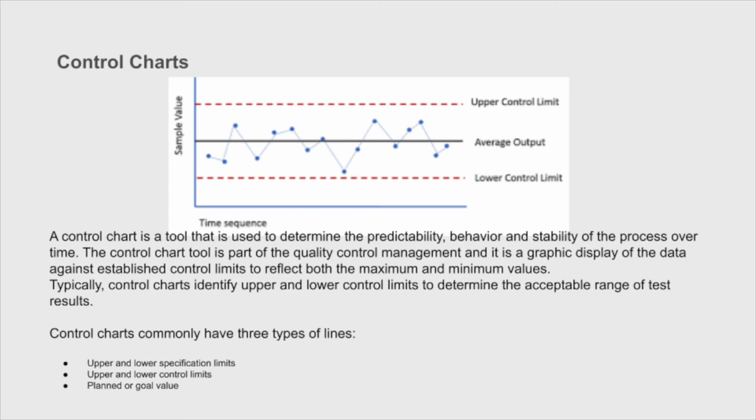And that effectively means a deviation. So, if we're making a little above how many we expect to make in an hour, or if we're making a little bit below how many we expect to make in an hour, well, how much is the little bit? How much of a little bit is acceptable? So what the control chart does is it plots the output in a given hour. So as we move along on time, which is along the bottom there, we'll look at the value or the variation from the average.